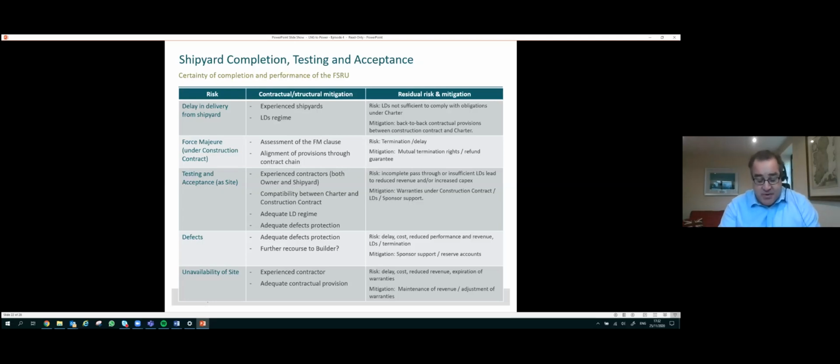But during the construction process itself, the project will want to have the right to oversee certain elements of the FSRU's construction to ensure that the unit is being constructed in accordance with the terms of the agreed technical specification. It is likely that the project will also want to confirm its technical acceptance of the FSRU prior to the FSRU sponsor having the right to take delivery of the unit at the shipyard from the builder under the terms of the construction contract.